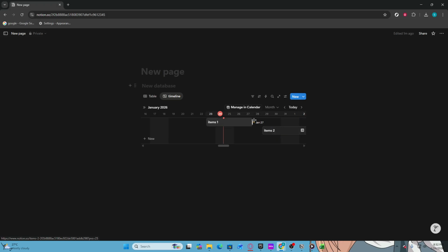Finally, drag the arrow from the first task to the second task to establish a dependency. This action visually connects the two tasks, indicating that one is dependent on the other. You should see a line connecting both tasks, confirming the dependency.